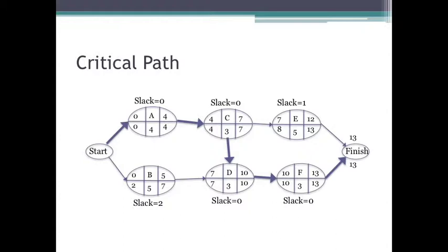So you have to be sure that the task is on the critical path. That's the first thing. And so, what else? Well, we are looking for bargains here. We don't want to spend too much money. So we want to look for the task that has the smallest crash cost per week that's on the critical path. More to the point, that crashes all the critical paths, as we'll soon see. So, clearly, we have some options, but we need to choose the best one.